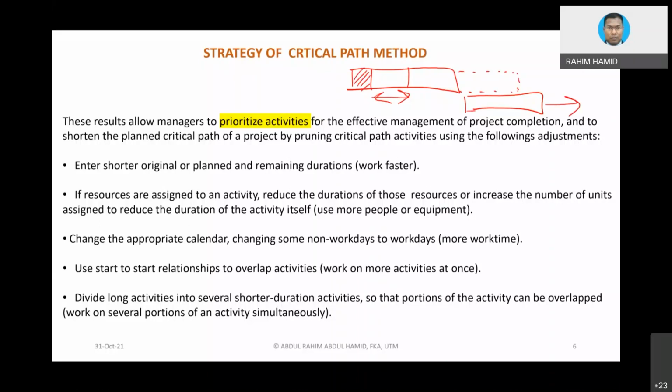That is why, when you update a project, you can split the activity. You can split this activity, and then a certain portion of the following activity can be connected instantly. So you don't have to wait for the whole activity to complete, especially when you are doing a large span of slab or many units of houses. Otherwise you are going to prolong the entire project.